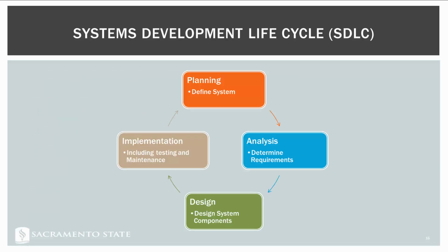So this leads us to something called the Systems Development Lifecycle, or sometimes the Software Development Lifecycle, or the SDLC. This life cycle helps us define the different phases or stages that happen during the development of a system. There is a fair consensus about all of the different things that go in them, but there is some disagreement as to how these get chopped up into different stages. In this class, we're going to use a 4-stage model: planning, analysis, design, and implementation. Some individuals break it up slightly differently, but in this class, that's how we're going to break it up.